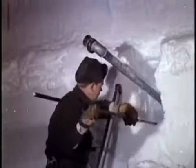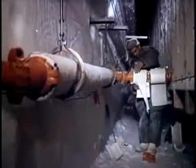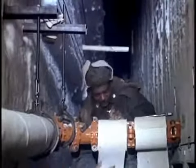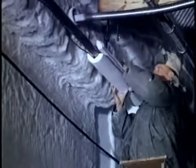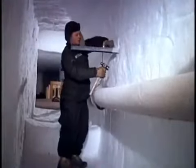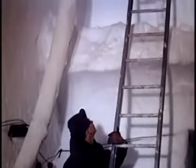At this same time, within the tunnels already completed, we were installing piping for water and electricity. Heavy insulation material was wrapped around every pipe to protect against the extreme cold. A copper heating element inside the insulation kept water lines from freezing. Flexible sewage lines also had to be run through the camp. To keep on schedule, we were using 12 and sometimes 14-hour shifts.